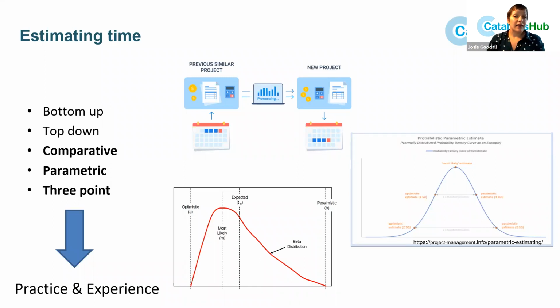However, if it was something like writing a thesis and I knew what one chapter would take and how much resource was needed by that, I might have to put a model in place, because as I write more and more chapters, I'm going to get more and more bored. So they might take slightly longer. But also I might get slightly better at it. So I might be slightly faster. So there would be then a mathematical model to predict how the estimate for the one task related to the whole project. So building the models is time consuming, but if you get the right model, it should give you a good estimate of what the project is going to need and how long it's going to take.